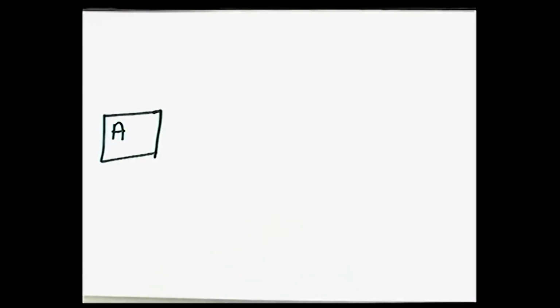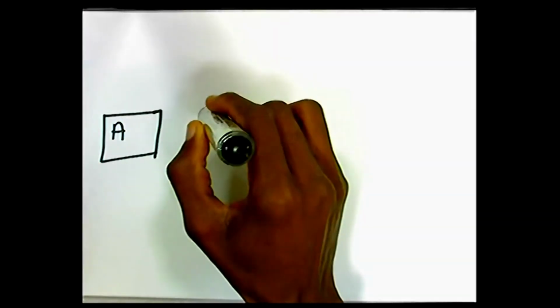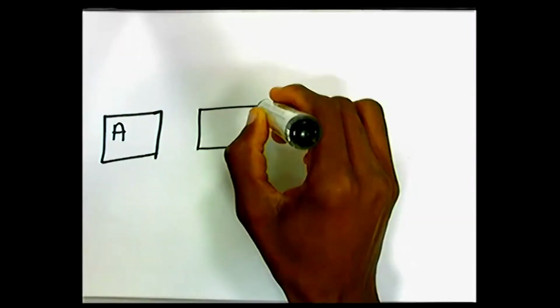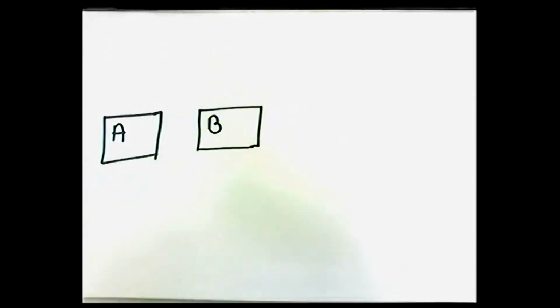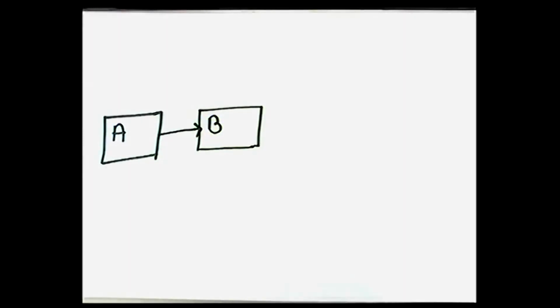Then activity B is preceded by A, so the immediate predecessor of B is A. You can put B anywhere on this paper and connect it, apart from putting it behind A or directly on top of A or below A. Just look at it like a forward movement because we are looking at time. Okay, so I put my B here. I hope that is okay. And then I introduce an arc, or what we call an arrow, telling me that I am moving from A to B.